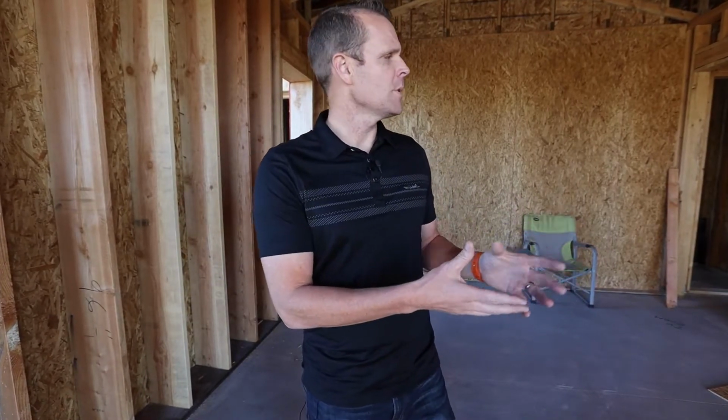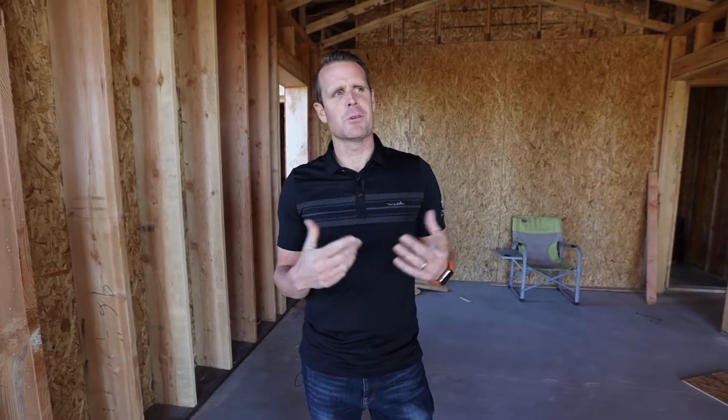It's really difficult for a remodel company to come and build a house, because if they have 2 or 3 framers on site, for them to come frame this house, it's going to take them a long time. It may take them 14 weeks, or it could take us 6. And so that is the biggest difference.